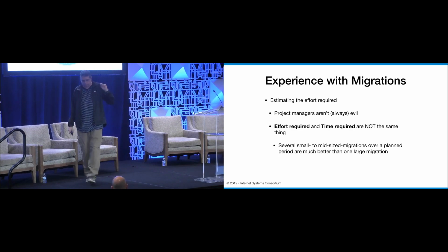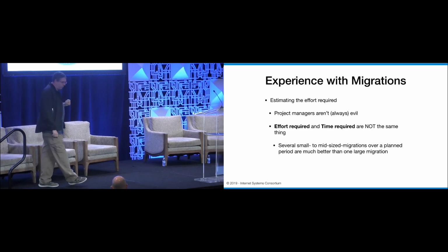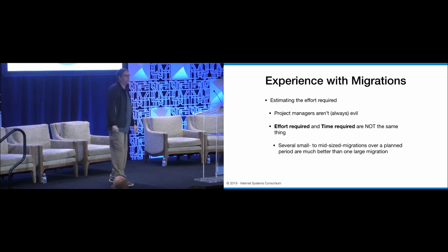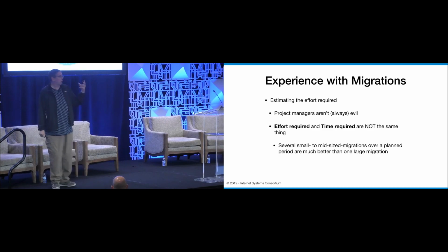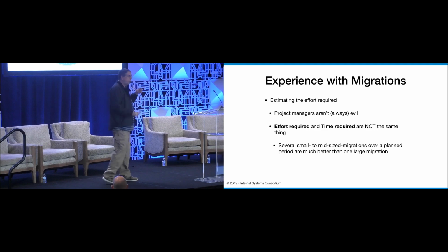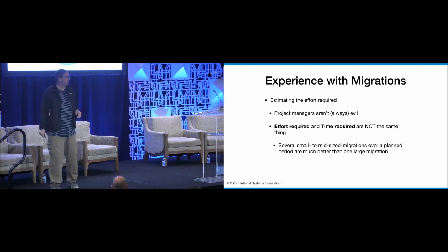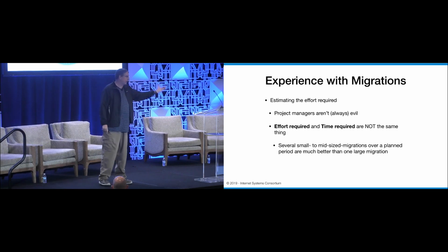And I will tell you from personal experience, several small to mid-sized migrations over a planned period are much, much better than one large migration. You go in and you say, well, when you guys come in on Monday, DHCP is all going to be new, it's all going to be great, and so you decide to make the big change across a huge organization overnight. You're setting yourself up for some real pain and suffering. So think about the organizations. Think about how your network is actually split up, and pick out individual pieces and look at migrating individual pieces instead of doing the whole thing at once. Go in, obviously, with labs. Your lab network, that's going to be something that you're going to need to test on.